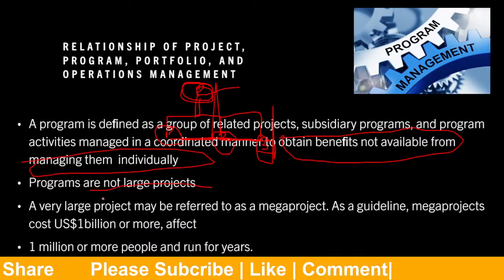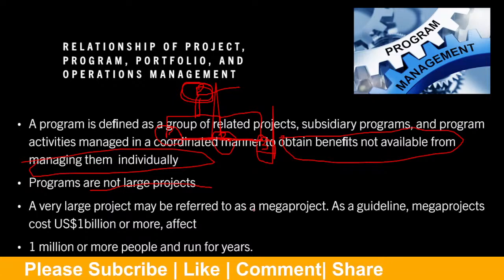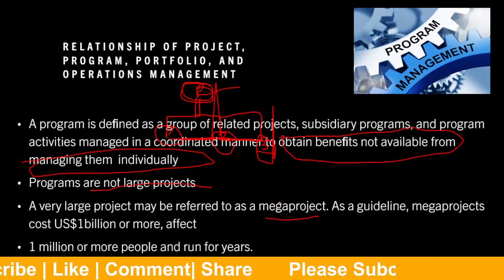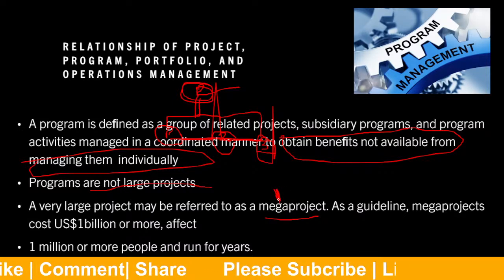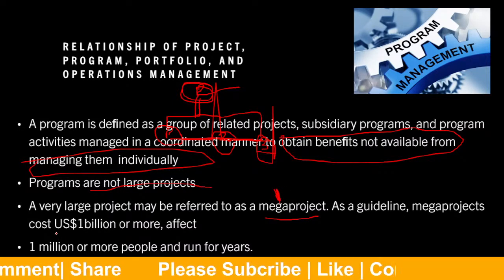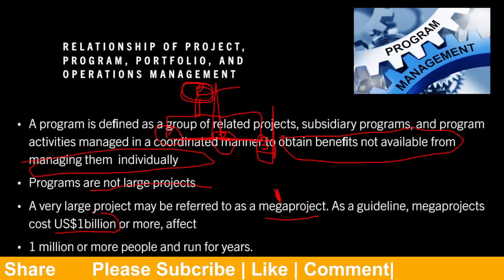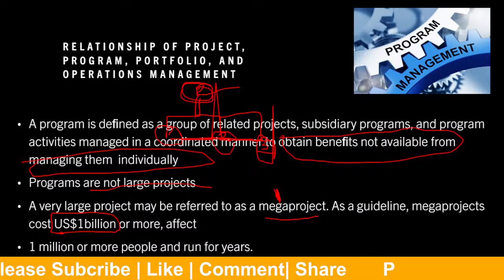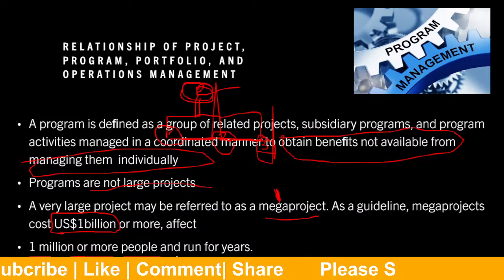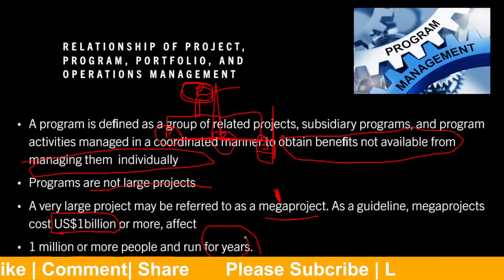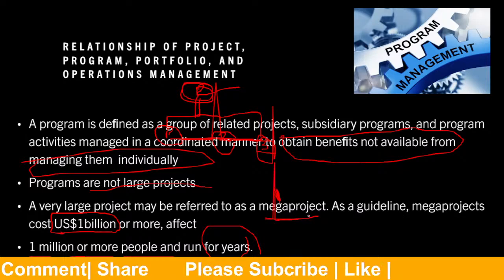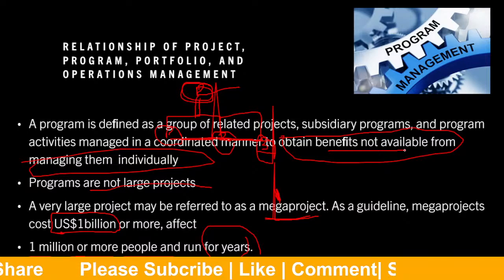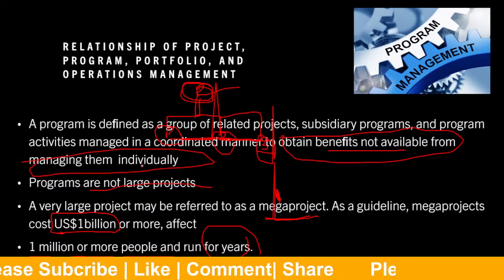All right? A very large project may be referred to as a mega project. And for you to refer to a project as a mega project, it must cost more than or equal to 1 billion US dollars, and it must affect 1 million or more people and run for years. That is a mega project. But for a program, you want to obtain benefits not available from managing the projects individually.